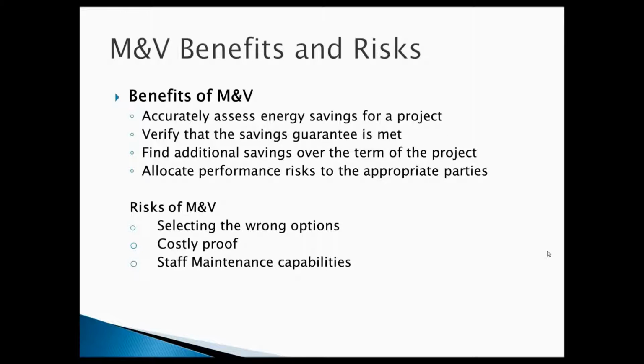You can do a lot for the proof that you're saving. One of the things I always said was don't pay $10 to prove that you've saved $1. So really look at those options and the costs of them. If you need option C to prove that you've gotten your savings, then definitely put it on there. But if you can add in making sure you're monitoring your bills and your maintenance people are monitoring the systems, take a look at the cost of those options.